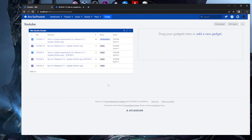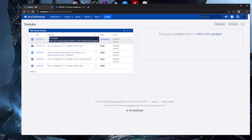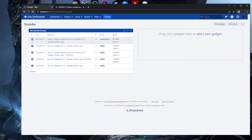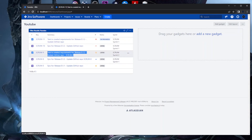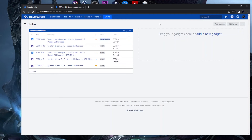The Filter Results gadget now shows five issue types based on the YouTube filter, with the columns we chose. The Sprint column is useful because in this example, three tasks are in the current sprint (Sprint 1) but one task is in Sprint 2. You don't want to work on next-sprint tickets, so having Sprint visible helps you stay focused on the right work.